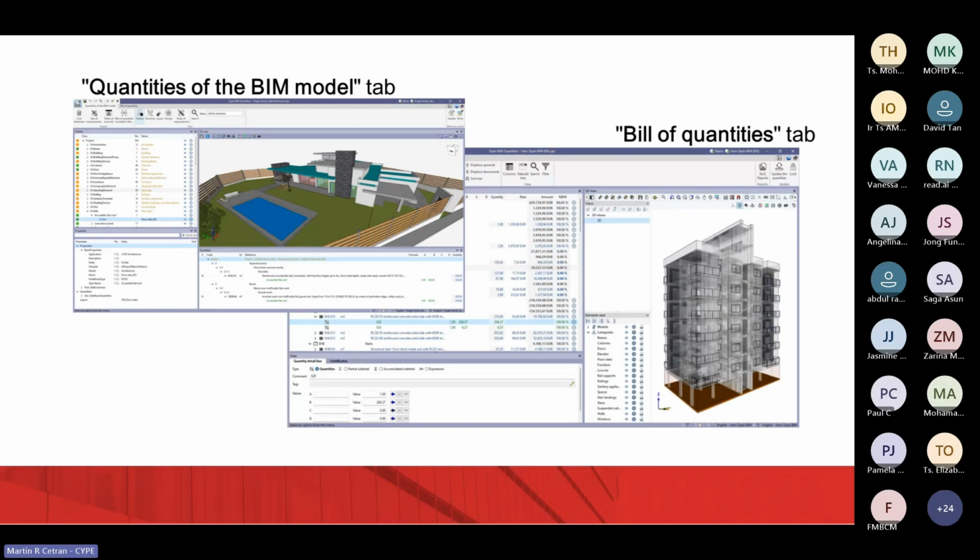But that's one thing. In the real world, in the actual projects that we need to document and quantify, a wall could be many things. It could be brick plus air chamber plus insulation plus finish. It could be one handcrafted artisan solution, only from this area, specialized for a wall. We have maybe one specific bricklaying disposition that's not even bricks. Maybe it's just one specific material coming from clay or whatever. So we could have a regular solution for a wall, brick plus insulation plus air chamber plus finish, or we could have a handcrafted thing that's locally artisan made, or we could have one prefab industrialized wall, which is just one block with everything. And the complete technical information of those different items is completely different. And the prices, of course, are completely different.